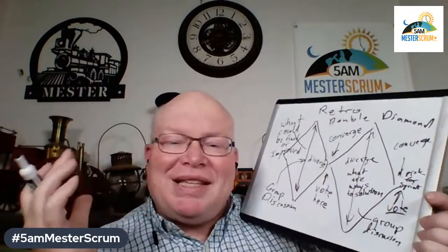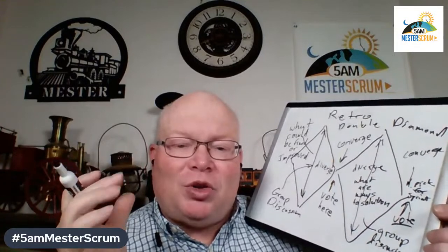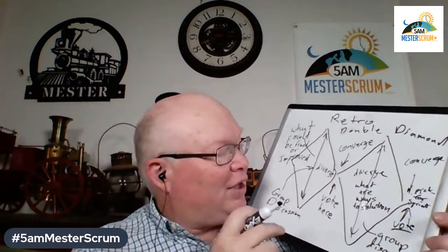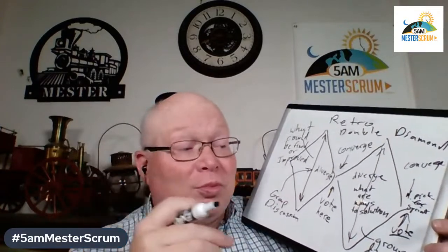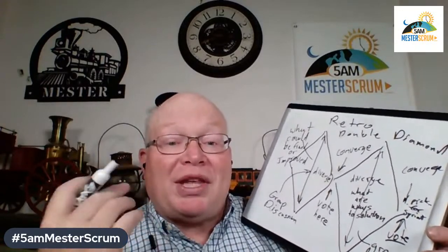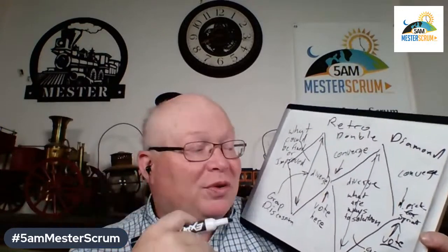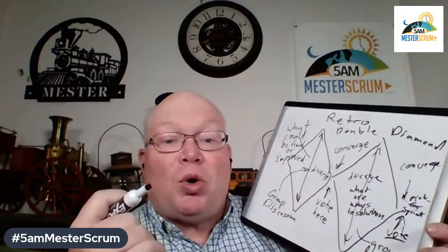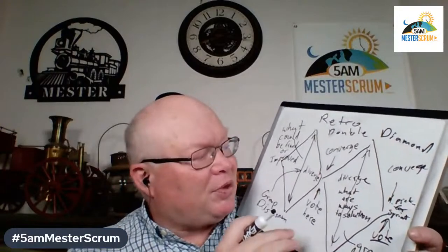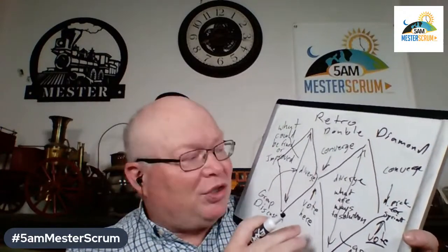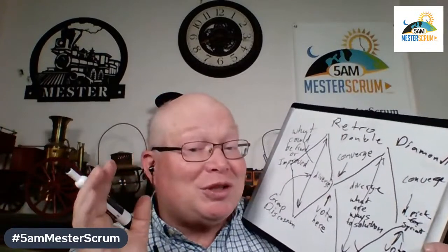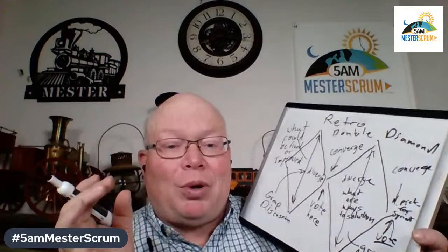Okay. So this is the basis for doing any retrospective that there is. You come into the room, you facilitate a divergence where they chat about all the things they could fix, all the things they want to improve. They converge and vote, in some form of voting which we'll talk about in future episodes, on what they want to achieve. Then they diverge again on all the solutions to solve that problem. Trust me, there's lots of ways to skin the cat. Well, we shouldn't say skin the cat.